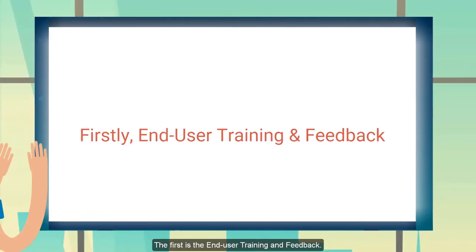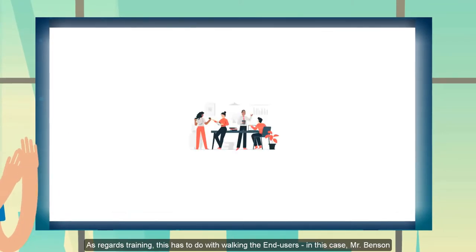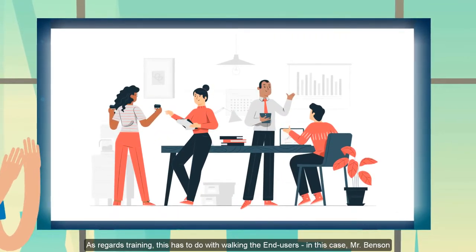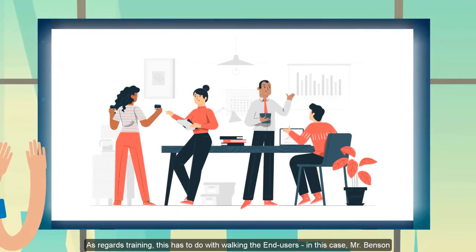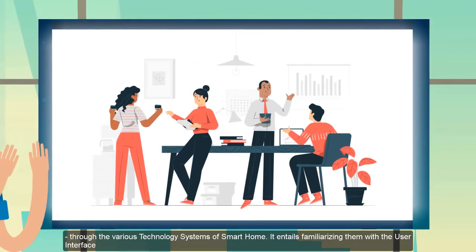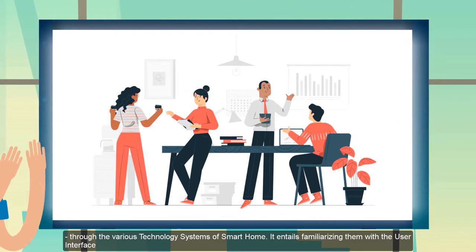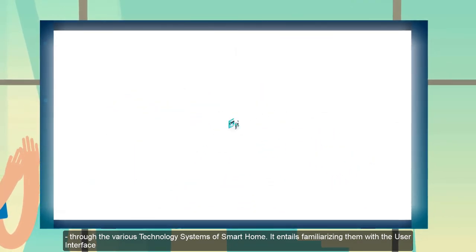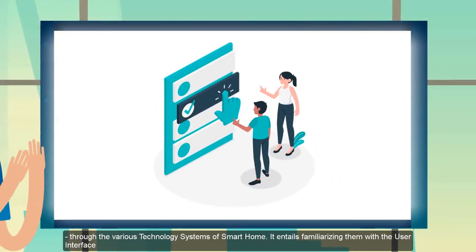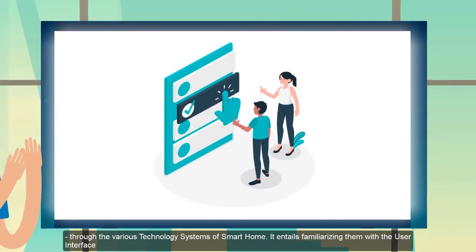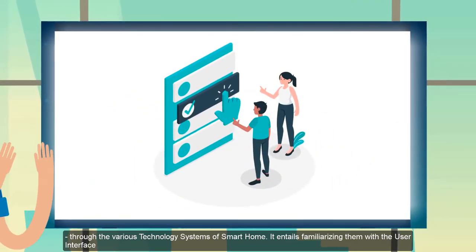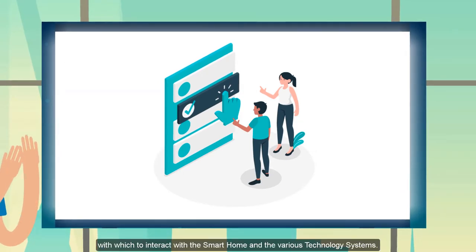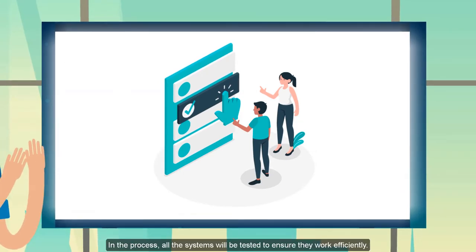The first one has to do with end user training and feedback. This involves walking the customer through the various technology and structural systems in the building, especially with the user interface and how they interact with all the systems.